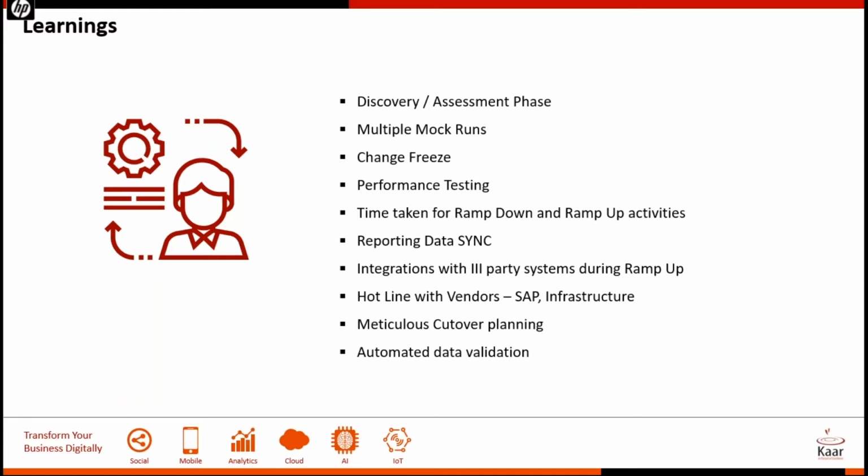And as you progress from one mock run to the other, you're going to have a lot of things that change. One is you're going to get fixes and patches from SAP, and you're going to get your own transports that have to be moved. So as you progress through each mock run, you test all these things. And you also test for the delta transactional data that you have in mock run n+1 as against mock run n. And when that happens, as you get closer to the production run, it really helps you, because by then you know the exact time to the minute of every task item that you're going to execute in your production, during your uptime, during your SUM downtime, during the migration, and during data validation.